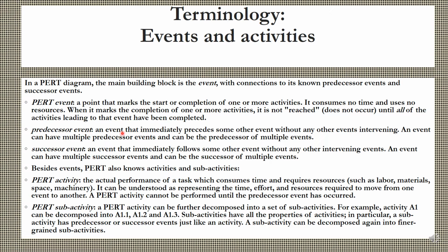Predecessor event: an event that immediately precedes some other event without any other events intervening. An event can have multiple predecessor events and can be a predecessor of multiple events. Successor events: an event that immediately follows some other event without any other intervening events. An event can have multiple successor events and can be a successor of multiple events.